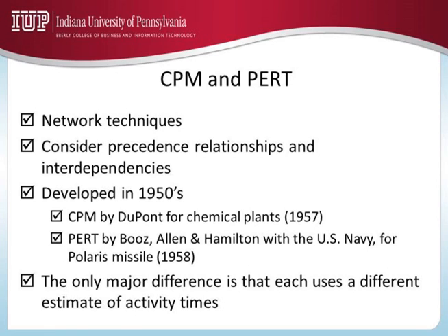So you have three estimates here. 16 is the optimistic, 21 is the most likely, and 30 is the pessimistic. That is what PERT does. CPM just says it will take 20 days. That is deterministic, whereas the three different time estimates in PERT are probabilistic.